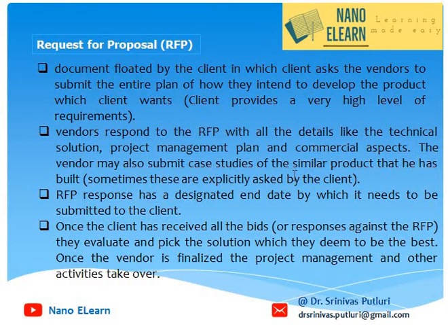The vendor also submits the case studies of similar products that they have already built in their earlier projects. Sometimes these are also explicitly asked by the client. The RFP response has a designated end date by which it needs to be submitted to the client. Once the client receives all the bids from different vendors, they will evaluate and pick the solution which they deem to be the best. Once the vendor is finalized, the project management and other activities will take over.